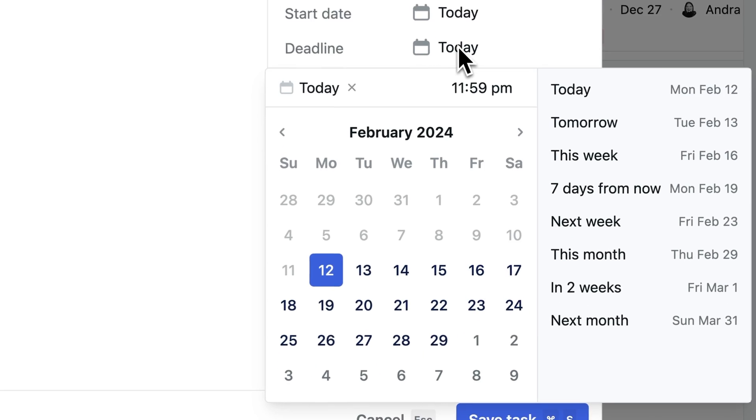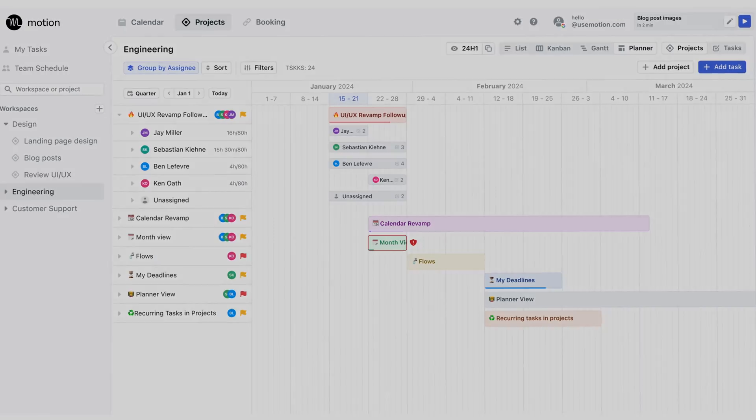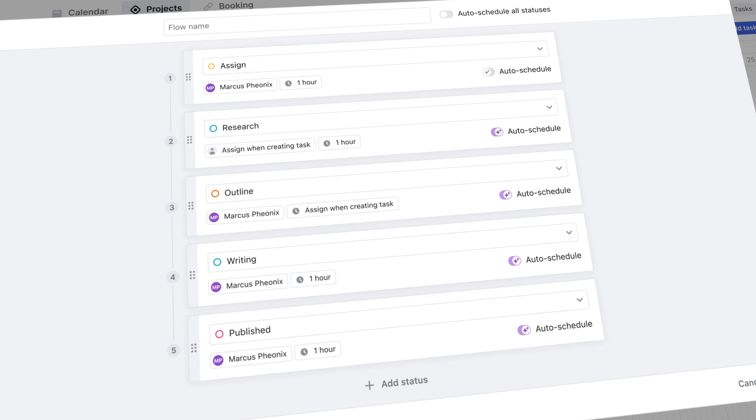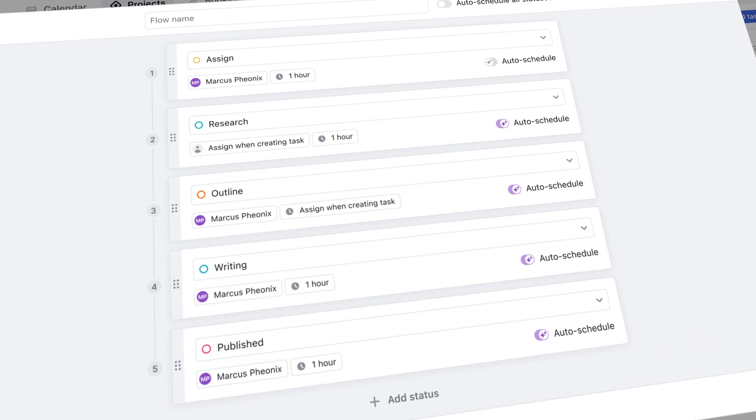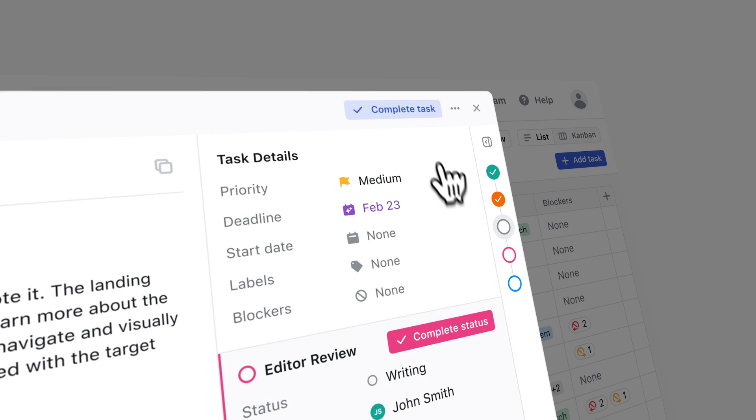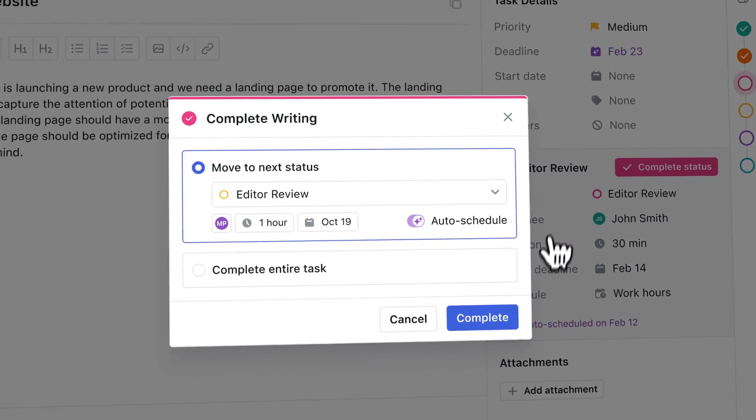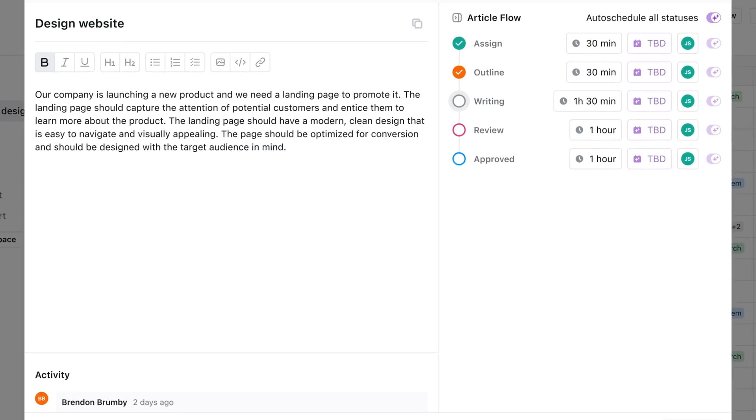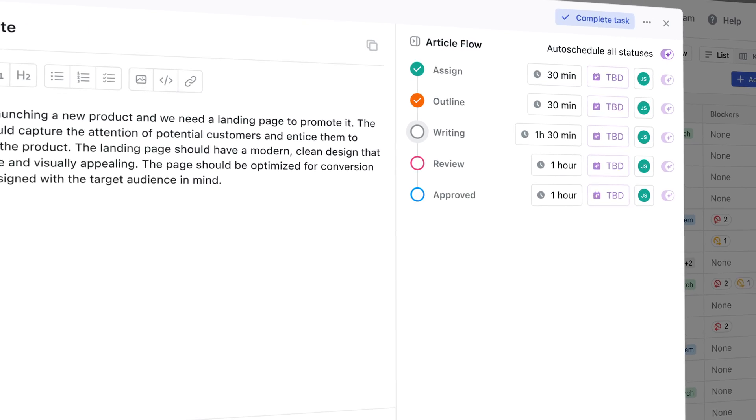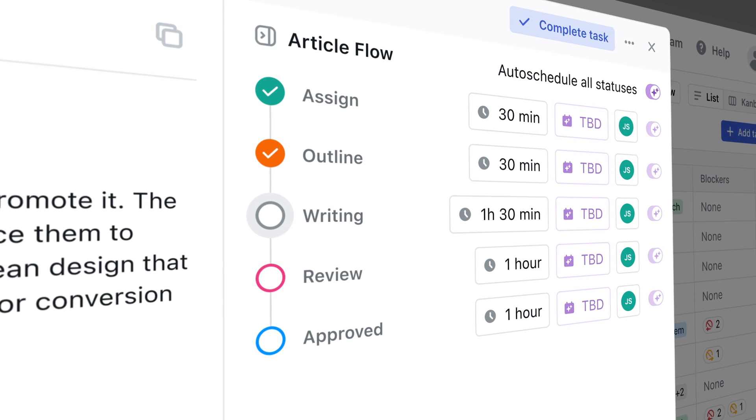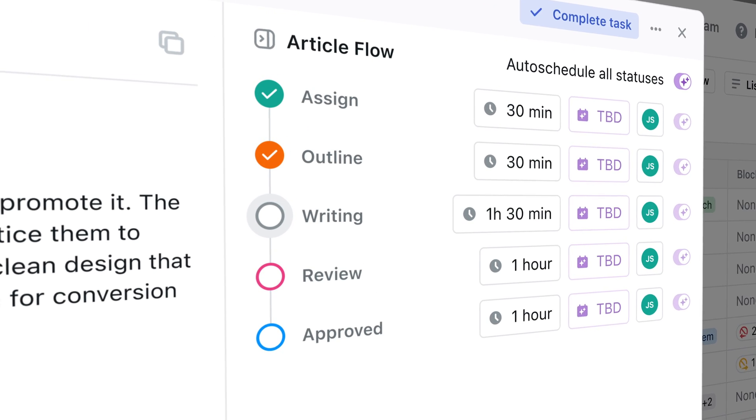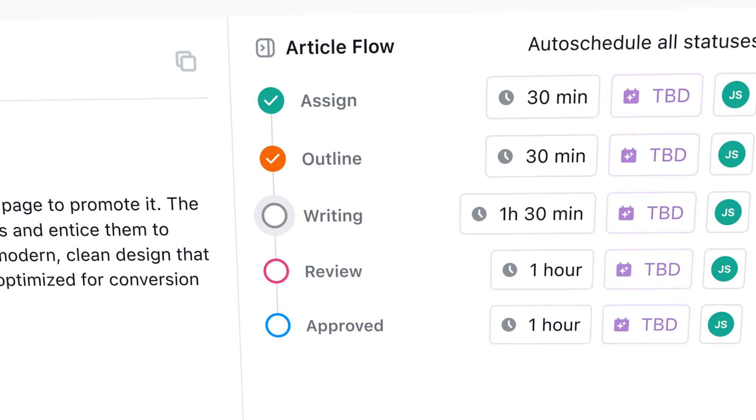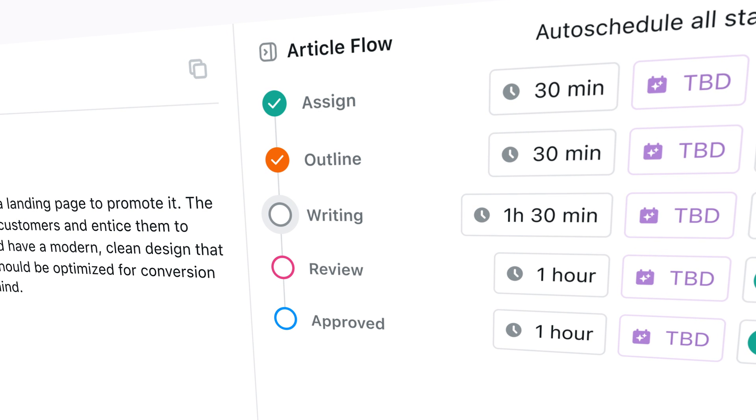The edit's going to take, I think, four hours, something like that. So flows let you transform a normal task into a processized task, essentially. Instead of changing the status of the task, you just mark the task as complete, and it's going to automatically assign to the right team member, the right duration, and the deadline. All the stuff that we were doing manually before is now just going to be part of our process and automated with flows.